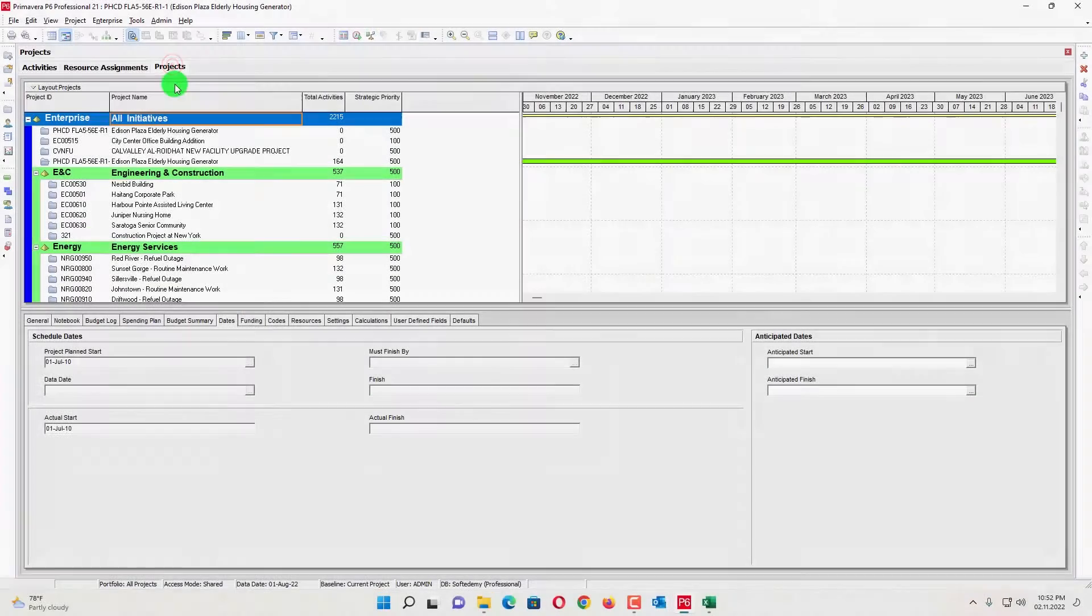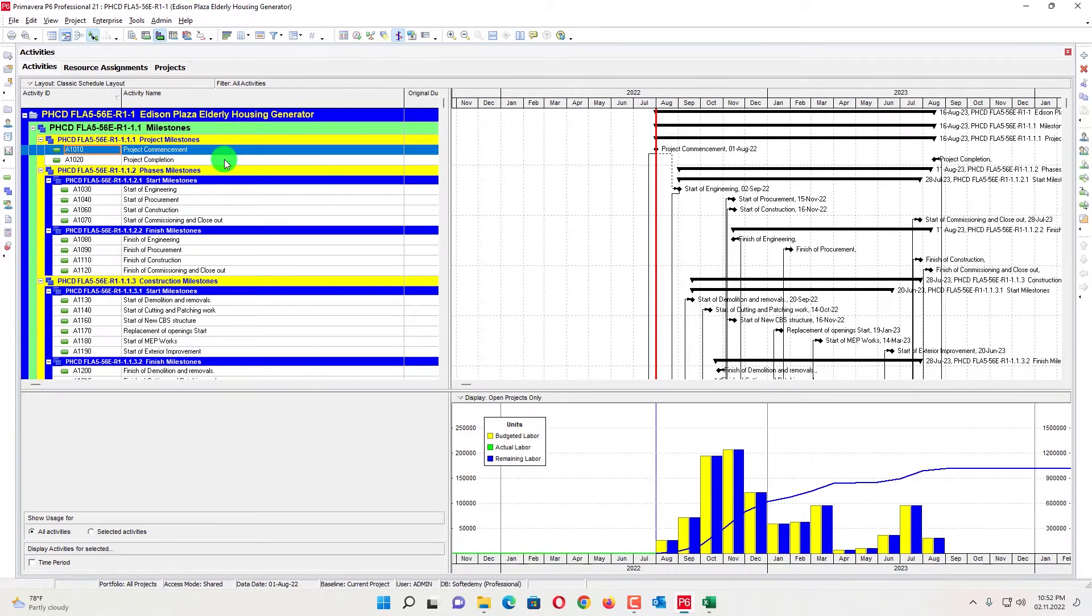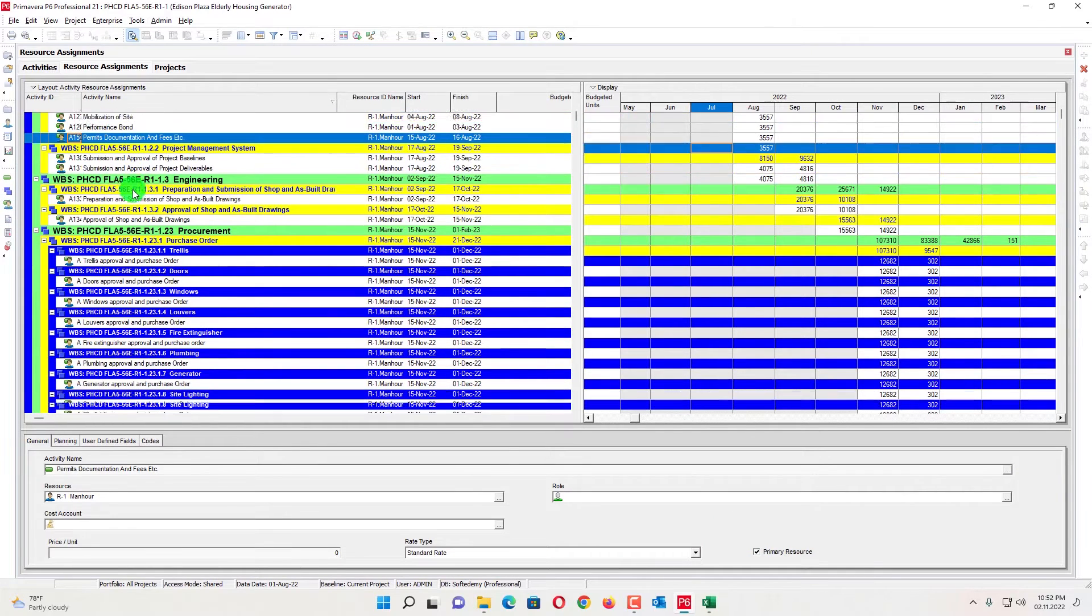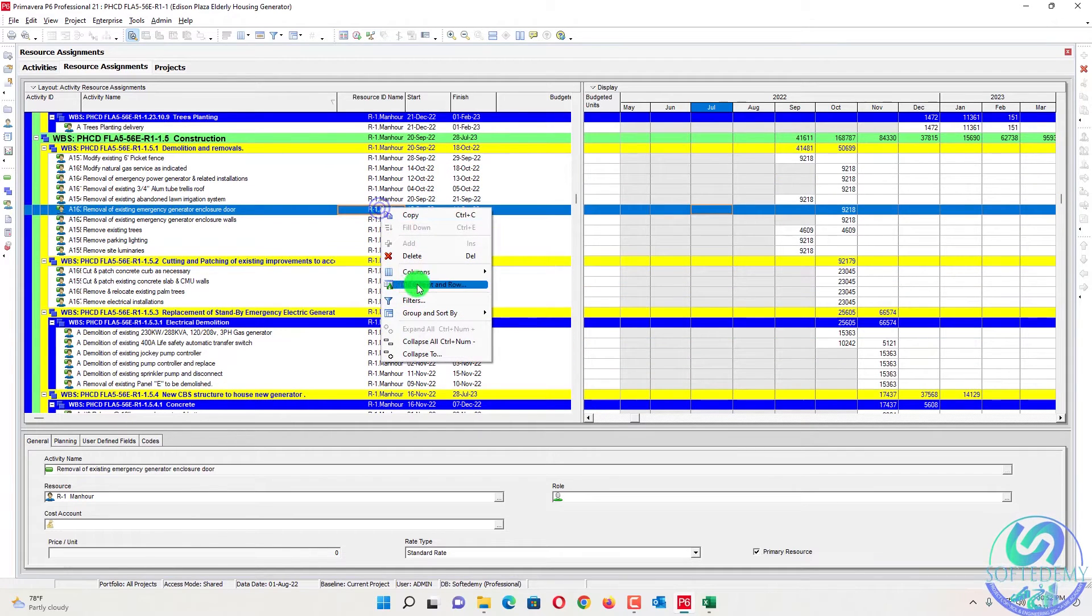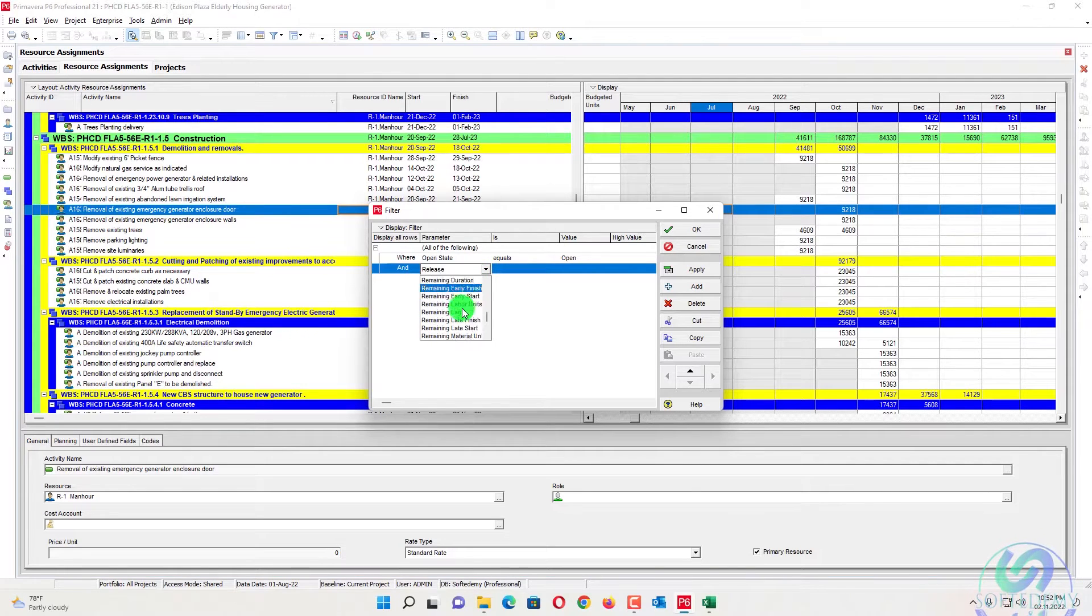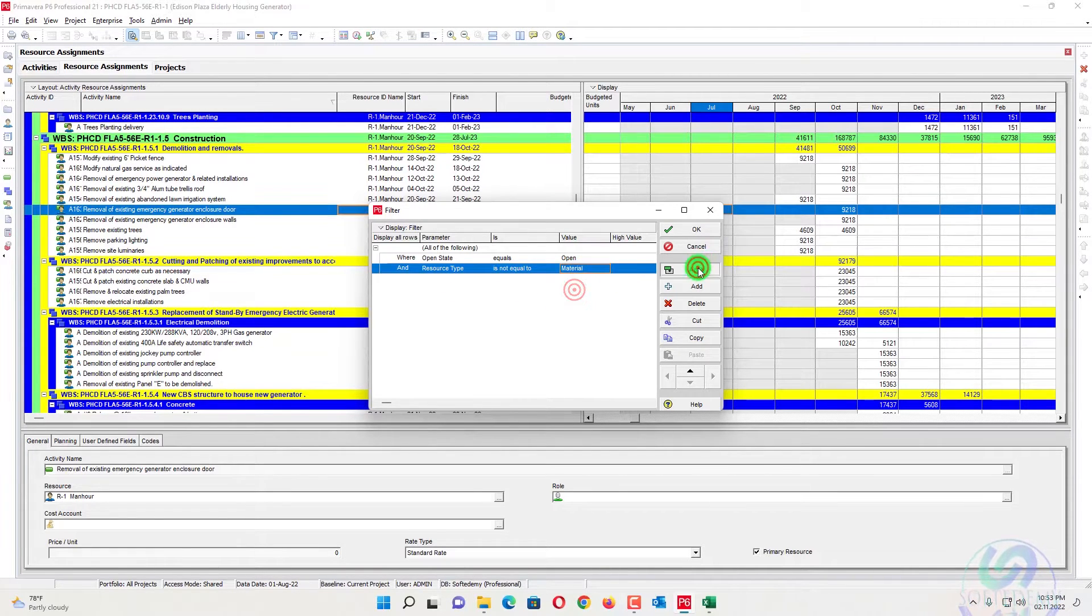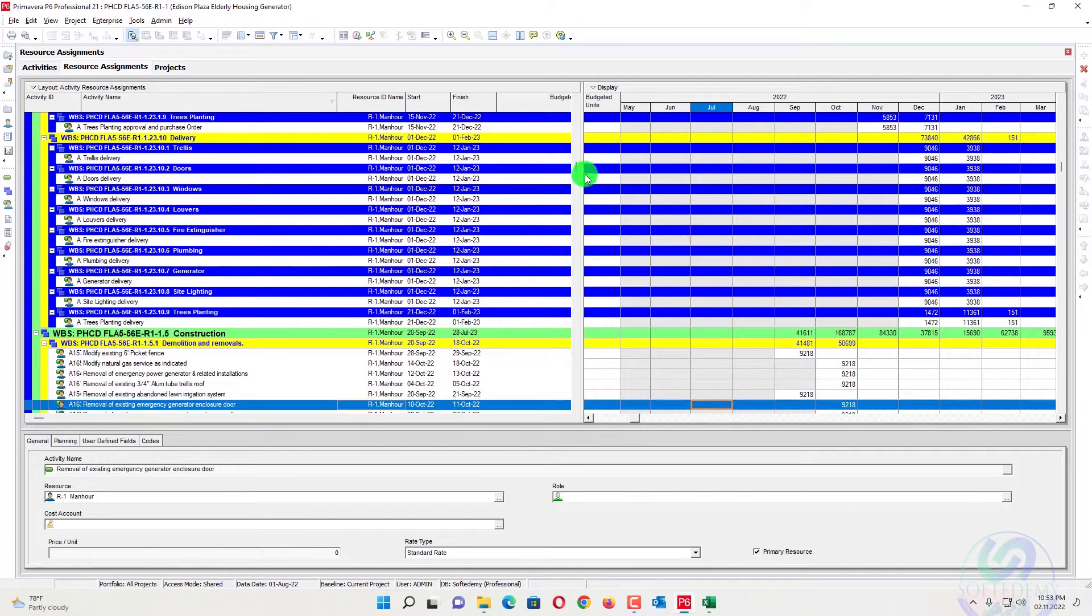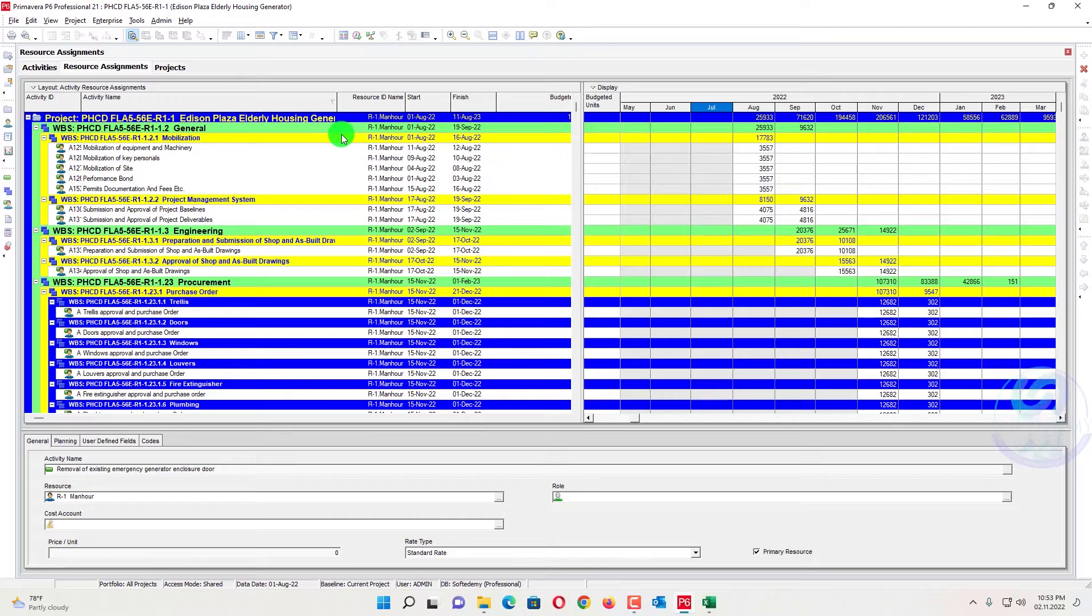So here we go, we will open a project that already has labor resources assigned. I will open resource assignment. You can see already assigned resources here. If you have any material resources assigned you can go here and create a filter, resource type is not equal to material. If you have any material resources assigned, all the resources will be filtered here. So only the man hours having labor will be displayed.